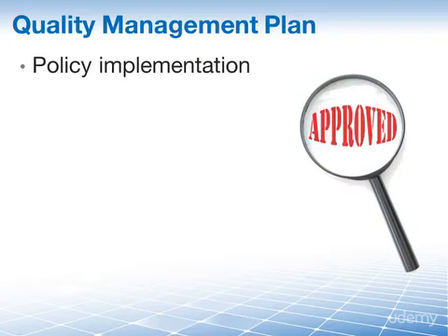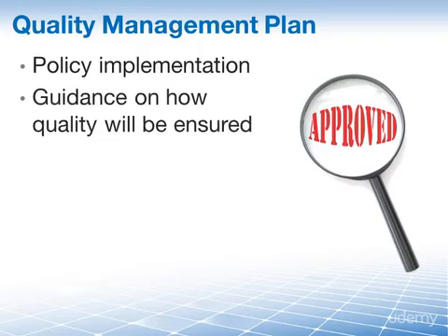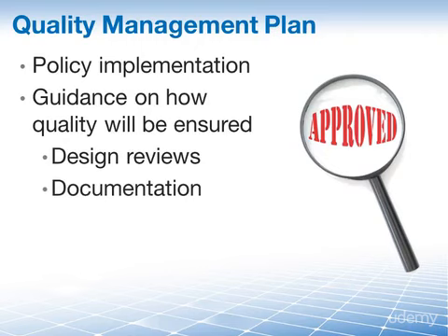And then you take this policy issued by your senior management and you translate it into your project, into your quality management plan. The quality management plan therefore provides guidance on how quality will be ensured on the project, through design reviews, through documentation, and through other protocols that you define as you translate the quality policy into the quality management plan.